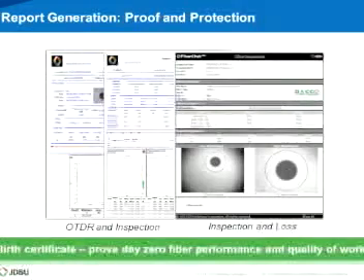So the question comes after, what do you do with those tests after they are done? Our equipment can provide the PDF report, that's the first certificate of the installation, that will enable you, if you're a contractor, to get paid by the provider, or if you're a service provider, to know what exactly is installed and how it looks for your record that can be used down the line if there is any issue.